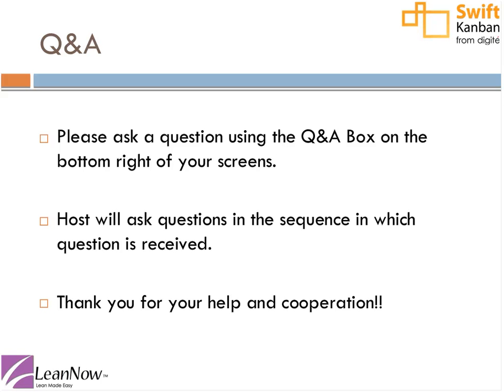And one more about the backlog board. Do we really need a backlog board to keep track of what we need to work on? If the balance of the input and output is very tight, so that you're actually producing or responding almost immediately to the input you're getting from your customer, you can operate without the backlog board and just have the work appear in the ready column on the Kanban board itself. And there's nothing wrong with that. In fact, that's just a sign of high synchronization with your customer and fast response.